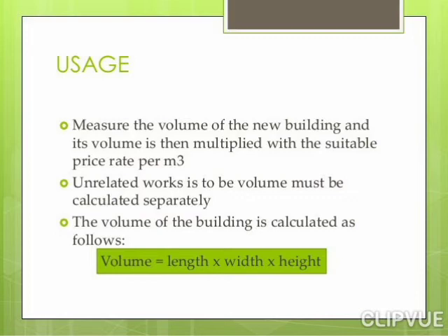Usage. Measure the volume of the new building, and its volume is then multiplied with the suitable price rate per meter cube. Unrelated works are to be calculated separately. The volume of the building is calculated as volume equals length times width times height.